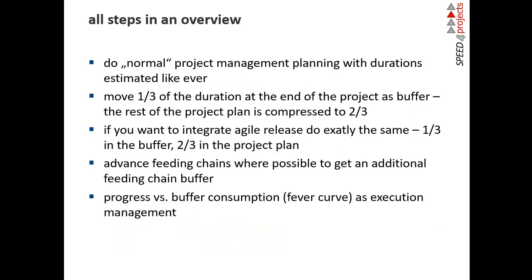In the end, Critical Chain is very easy. You do a very normal project planning with all the durations, estimates like ever, with the 80-90% of course. Then just move one-third of the duration into the project buffer at the end of the project. The feeding chains are pulled forward in time, so you get some additional feeding buffer. The execution management is all about checking buffer consumption versus progress. That's the Critical Chain magic. Now I'll show it in the Excel.